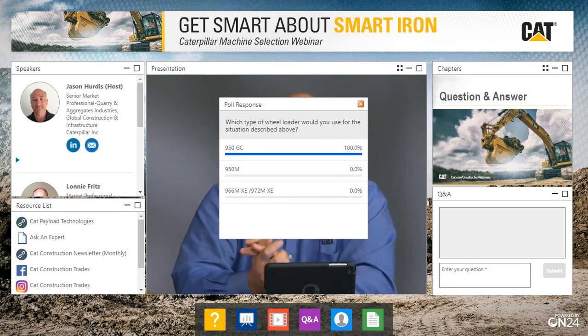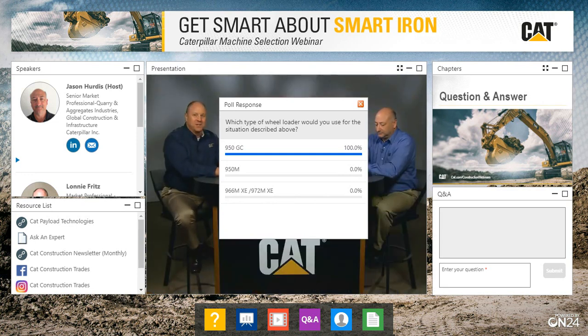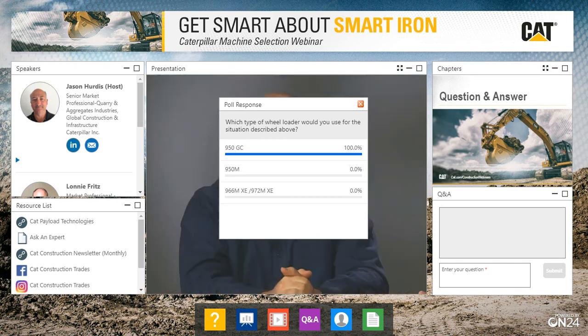When integrating a bunch of technology, doesn't it just add costs? Well, let's go back about 15 minutes when I said, in our perspective and in the industry's perspective, technology is not a cost, it's an investment, Jason. So the right technology for the application will not drive up cost, it's going to drive down cost. Our studies have proven this. I led a study comparing traditional ways versus technology ways in road construction applications. Just take, for example, grade control. We're out there up to 45% gain. If you slash labor cost and the hours on the machine by up to 45%, technology is truly an investment. If it's not bringing an ROI, yes, it's not necessary. But a lot of people look at that upfront cost and acquisition, but if you really cast that out over the life of that machine, it is putting money in your pocket.